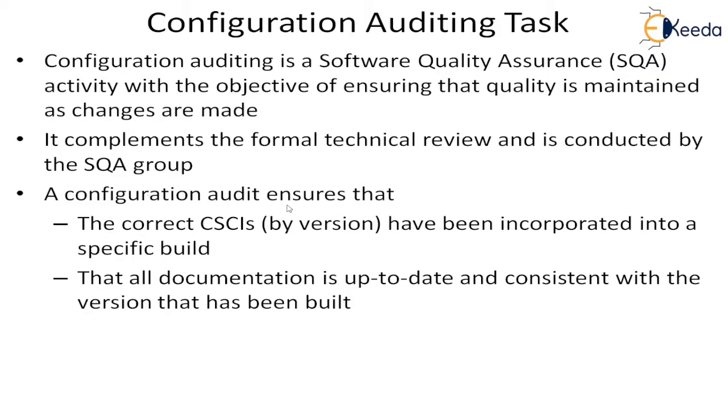A configuration audit ensures that the correct CSCIs have been incorporated into a specific build, and that all documentation is up to date and consistent with the version that has been built. It gives the SQA people a facility to review whether the release is correct, whether the version has been properly built, and whether the documents are up to date and consistent in the new version.